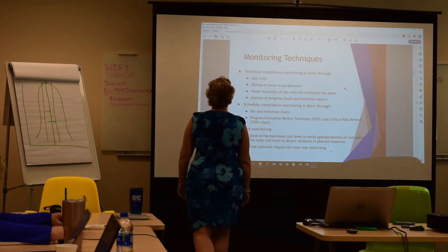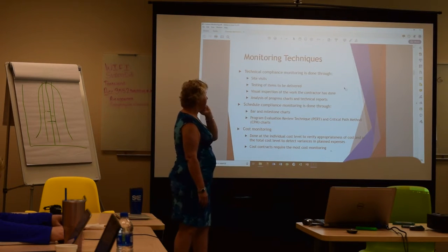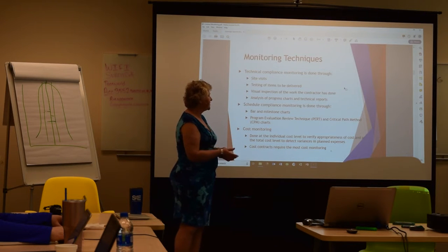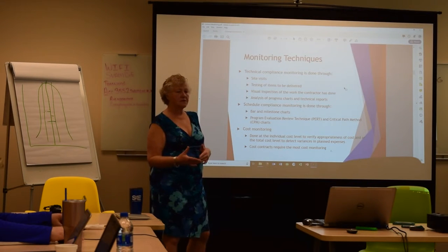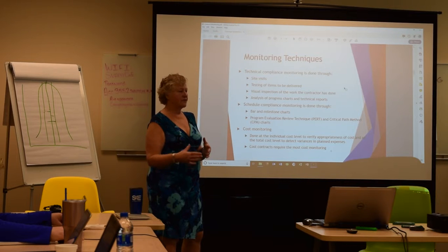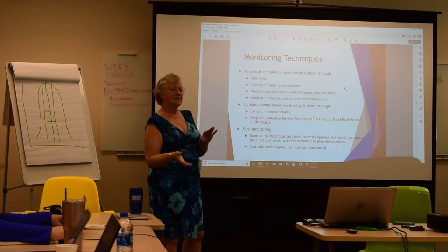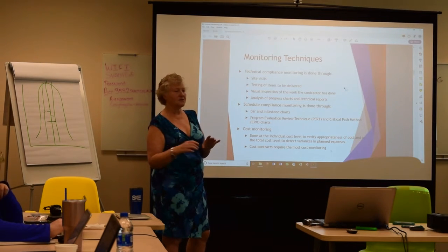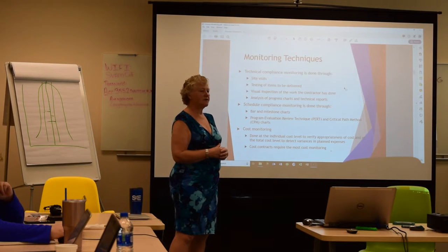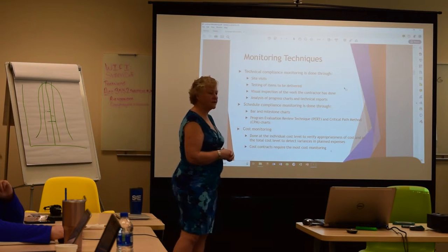They can monitor you through site visits, coming to your location, testing items to be delivered, any kind of visual inspection of the work that you've done, or they can just look at reports that you've submitted to them. Keep in mind, any report that you submit to them has to be truthful. If it's not, you're committing fraud. So this is not the time to embellish. I got 10 of these things done, but let's say I got 20 done, because that's what the project schedule says. That's fraud. You want to make sure you're honest in everything you're telling them.